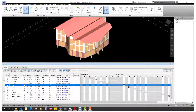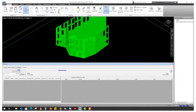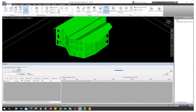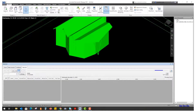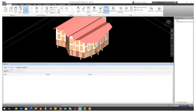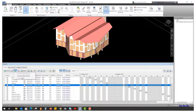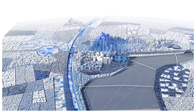Using Auto Add Tasks — found beside Add Task and Insert Task — you can add every topmost item from the model and it will automatically assign a date. These may not be accurate for the actual construction project, but it will break down walls, floors, roofs, doors, and windows into their Revit categories. You can also create Sets — for example, all your furniture, light fittings, second fix electrical fitout, partitions, stud work, and fireproofing can all be added into the Timeliner simulation.